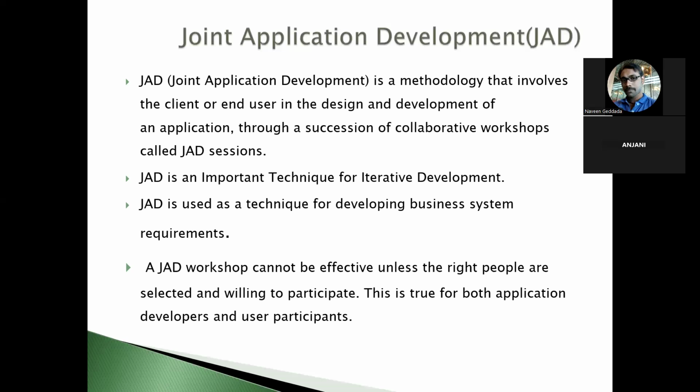If you remember when we discussed stakeholder management, our initial task is that we need to identify the stakeholders on the different areas in the client business. In order to identify the stakeholders, we are scheduling a common meeting around all the users, all the required members for the development of the application. And then in that meeting, we are taking the persons or the members who are responsible, or who are accountable, or who need to be informed on certain areas of the development of the project.